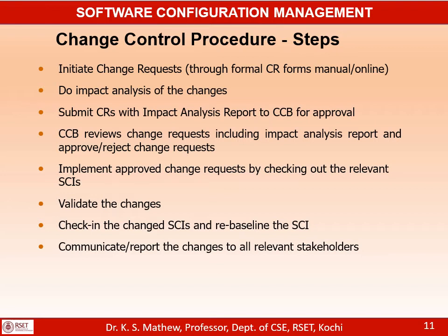Once a change request is initiated by a stakeholder in the project, the project manager or the project leader will assign a team member to analyze the impact of the change on the project. The assigned team member will analyze the impact of the change with respect to schedule, cost, what are the various work products that have to be changed because of this change request, and what is the additional time and effort required for making these changes.